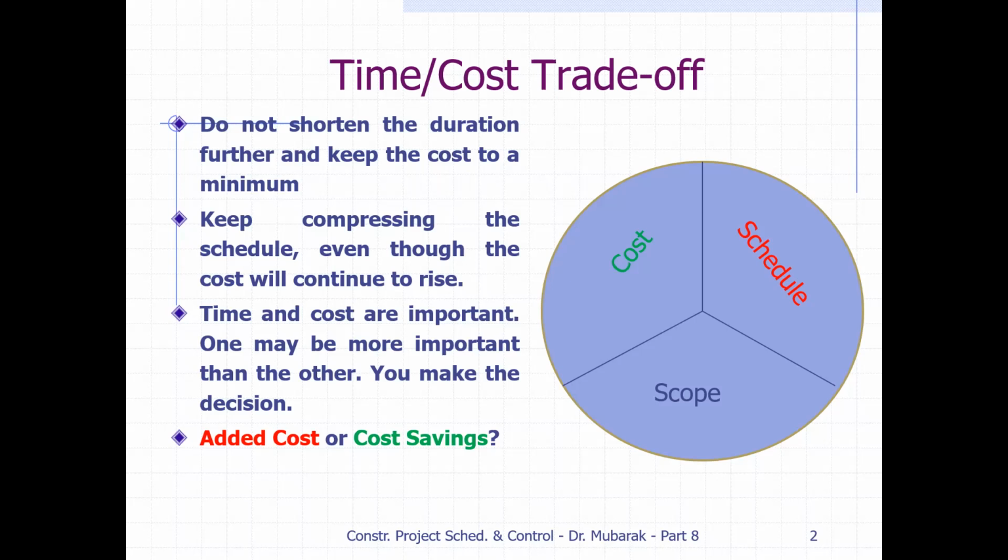Even if we achieve the optimum time and least cost or minimum cost for the project, we can still shorten the schedule, but the cost will increase. Okay, we can still shorten the duration, but the cost will increase.